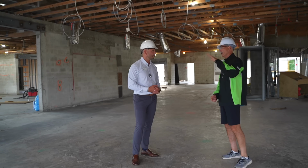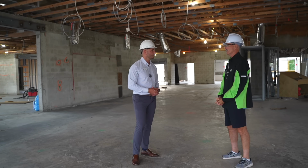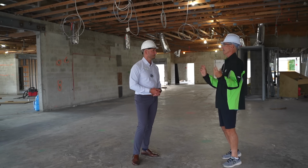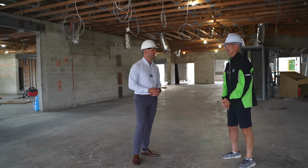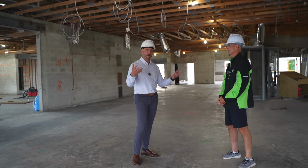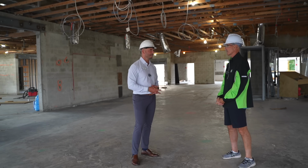And then another really great milestone: plywood and waterproofing, and now we'll be dry inside. And that means doors and windows are going to go in, and stucco. So we're definitely on target for November 1st for this building to look finished on the outside. That's incredible. You bet. We've mentioned that in the past, but I think again coming up on this season in that time frame, seeing that, members are going to just be so excited.